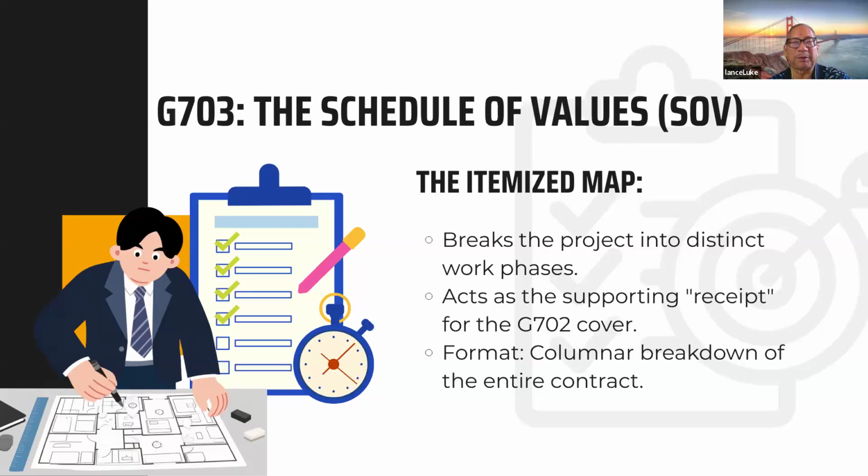On a high-rise building, there could be hundreds of line items on the schedule of values, but basically it's broken down into building components, and then the contractor would bill a percentage of each building component. So let's say the first month of construction, the grading was done and the forms were installed for the concrete slab.